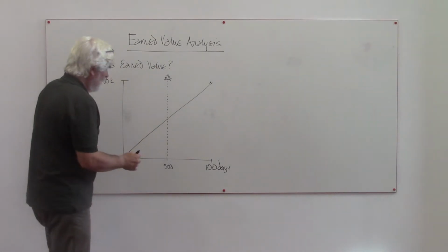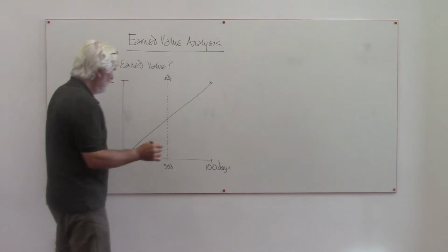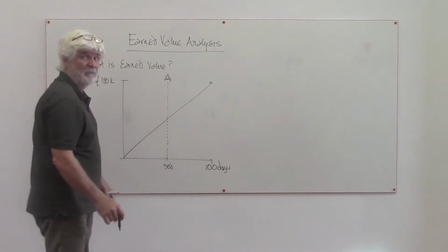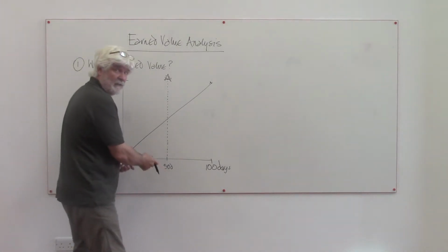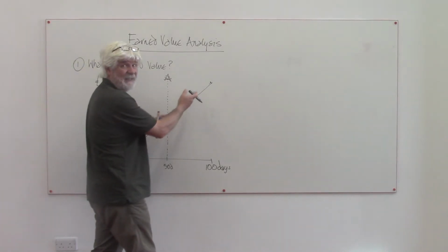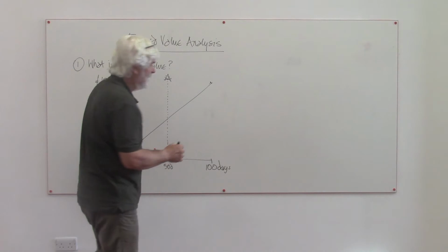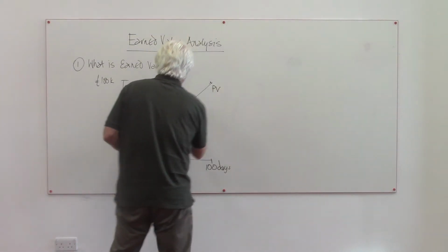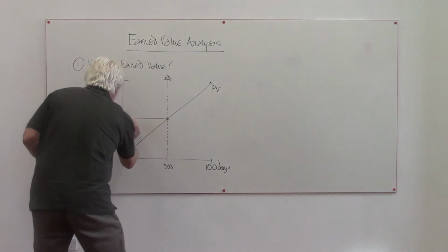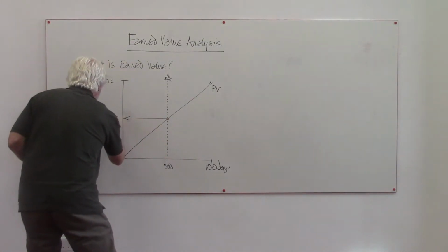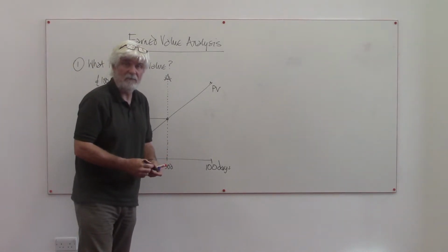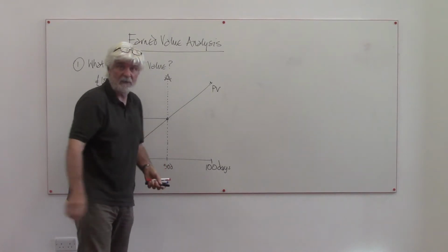Okay, so there's a line, it's day 50. What do we know? You need to be careful with the wording here. This line that I drew here was planned expenditure, wasn't it? Because we planned to do these things every 10 days, which would result in a cost. So that's the planned expenditure, or the planned value at any time. So that's PV. The PV, planned value at day 50, you won't be surprised to know is £50,000.